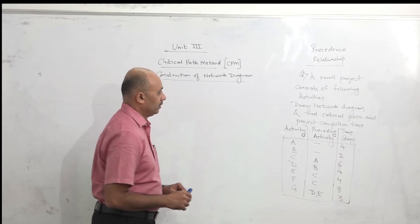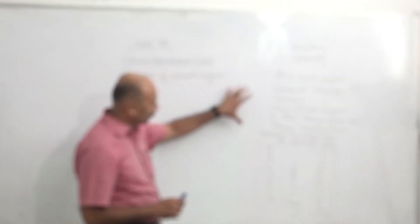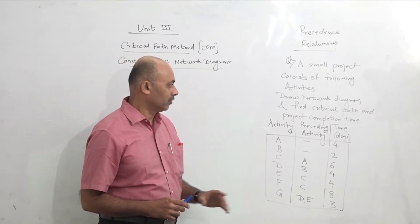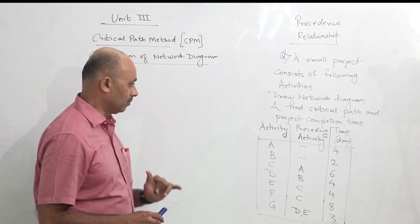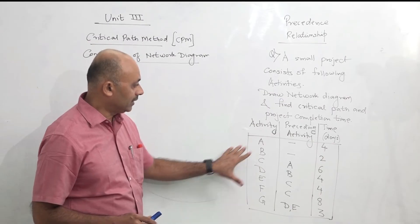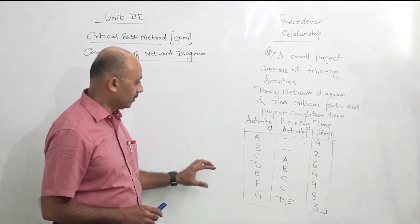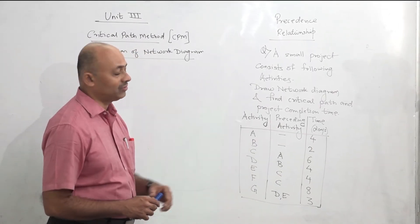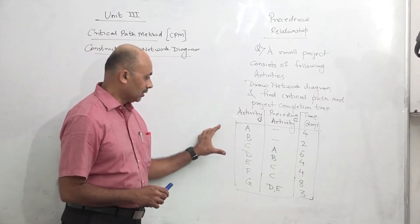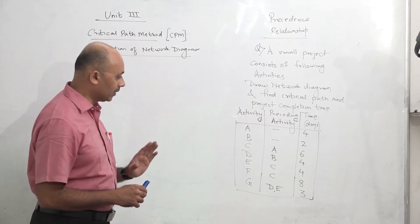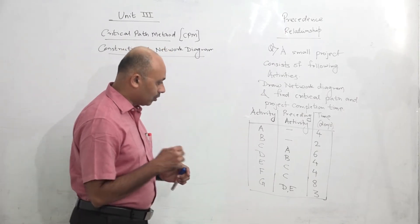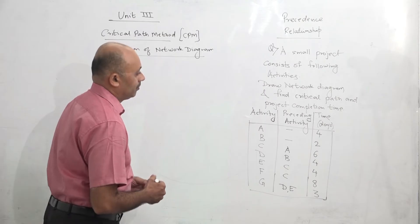In this question, a small project consists of following activities — draw a network diagram, find the critical path, and project completion time. Here, activity and preceding activity are given. That is why this kind of relationship is called precedence relationship — this is not a node relationship. The numbers of the nodes are not given, but activity and preceding activity are given.